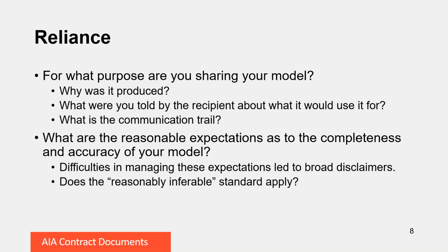It's a very common standard with regard to the 2D drawings. The contractor is to be responsible for building not only what actually appears on the 2D drawings, but also what is reasonably inferable from the 2D drawings. So that's the key concept to keep in mind: reliance.